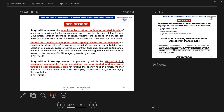When we look at the FAR, it tells us that acquisition begins at the point when agency needs are established. The number one risk factor is the failure of that organization to clearly define its requirements from the outset. Acquisition planning means a process by which the efforts of all personnel responsible for an acquisition are coordinated and integrated through a comprehensive plan. When the government asks for a subcontract plan today, they are referring to set-asides, not to other subcontracts, and the term subcontract management rarely appears in the government's vernacular.